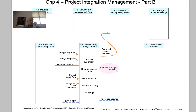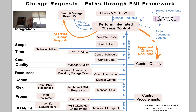Approved change requests also go through a check loop, which looks like this. They come through Control Quality, where we're going to check and make sure they were implemented successfully. And once we've verified that, we'll update the change log to reflect that through project documents updates again.